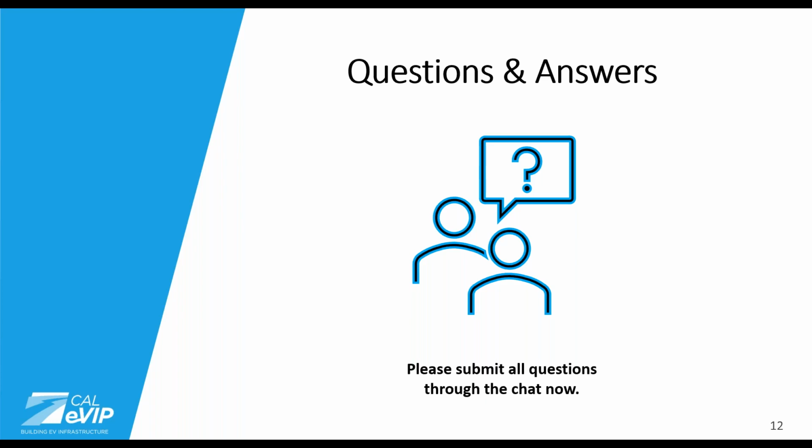There's a question: all this starts once you successfully upload everything to CALeVIP. Specifically for Block Grant 2.0 projects, day 0 is funds reserved. And then there are checkpoints along the way based on the timeline shared. So day 0 of the 450-day clock is the day funds are reserved.